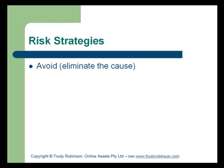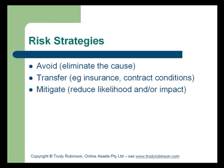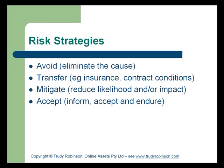The strategies for managing a risk may be to avoid it — undertaking tasks to eliminate the cause of the risk. You may transfer the risk; for example, in a construction project, you may have contractual conditions that manage the risk of bad weather, or take out insurance which transfers the risk and enables a claim if a particular circumstance occurs. You may also choose to mitigate a risk, which is reducing the likelihood and/or impact — if you cannot eliminate the cause, you try to reduce the impact by planning for it in advance. An organisation may also accept the risk; identification of the risk in advance means they can put actions in place to accept the risk and endure the outcome. These strategies are identified on pages 303 to 304 in PMBOK.